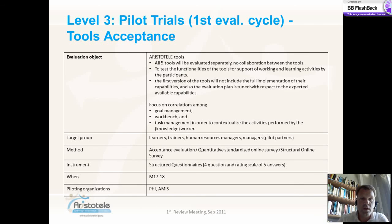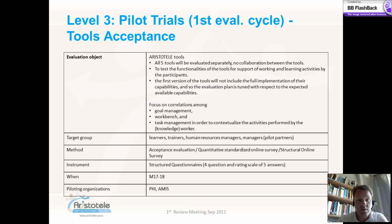Level three, the pilot trials, will focus on evaluating all five tools separately — not in an integrated Aristotle platform — to test the functionalities of the tools for support of working and learning activities by participants. The first version of the tools will not include the full implementation of their capabilities, so the evaluation plan is tuned to the expected available capabilities when they are ready. This will happen in months 17 and 18. Learners, trainers, human resource managers and managers are in the focus of the evaluation. It is an acceptance evaluation through a quantitative standardized survey.